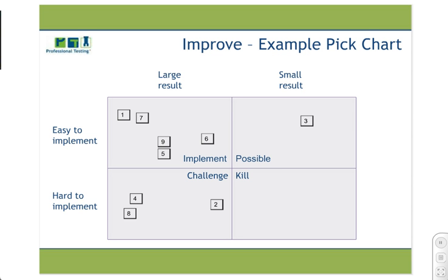In the control stage, it's even better, and you also define an upper limit and a lower limit to your measurement, and those are the triggers for action. If we are above the upper limit, we should investigate right away what's going on and how we can get back within the limits.